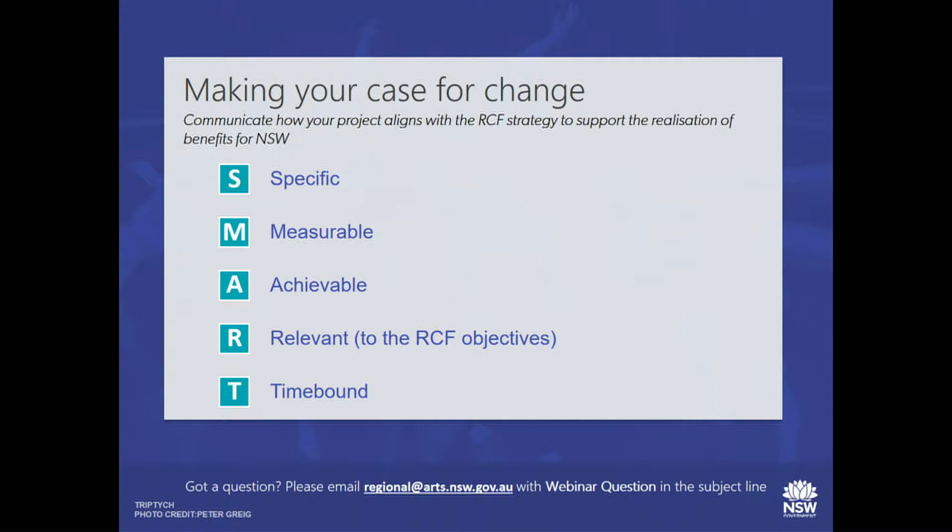Allow some contingency for periods like we're going into the Christmas period now, so that adds time on, end of financial year, other things like that. So just be mindful of that.